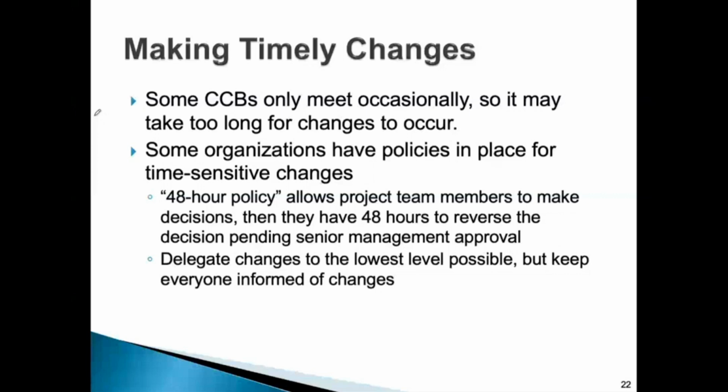Even if you do them, you need to go through the procedure within 48 hours. This is delegating this work to the lowest level possible. You keep them informed that we did this change, but you have to report it and get it approved within 48 hours. And this could be the project manager or someone lower than him in the hierarchy, based on the delegation policy that they follow.